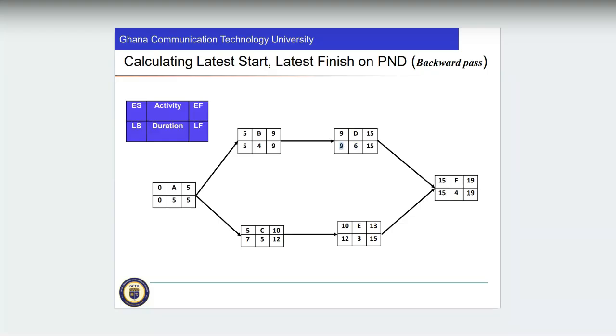So if you can see from here, latest finish minus duration is giving us the latest start, that is 15. So yes, we got it right.